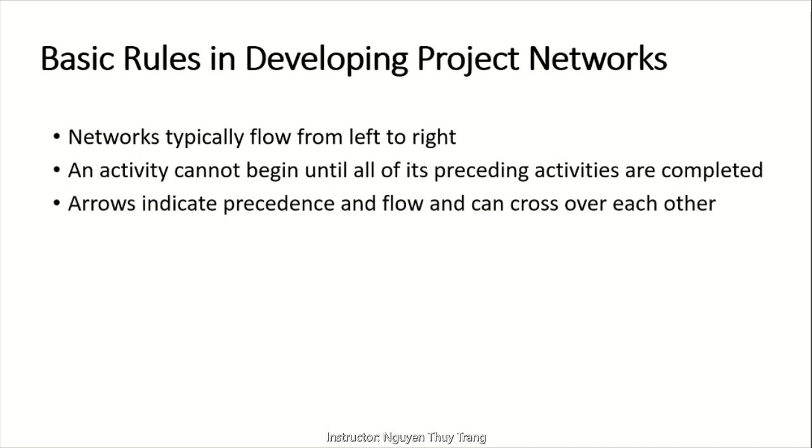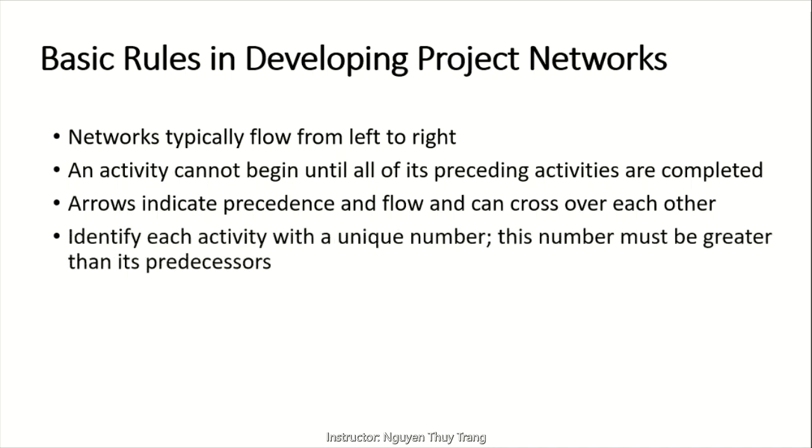Arrows indicate precedence and flow and cannot cross over each other. Identify each activity with a unique number, and this number must be greater than its predecessors.